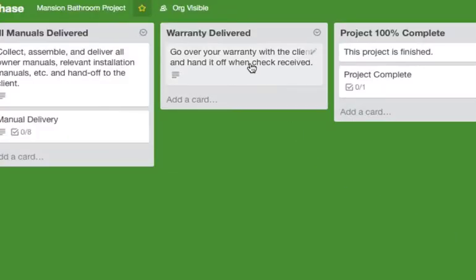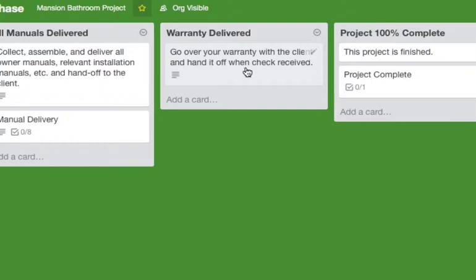And then finally your warranty. Go over your warranty with them very carefully and hand it off when the check is received.